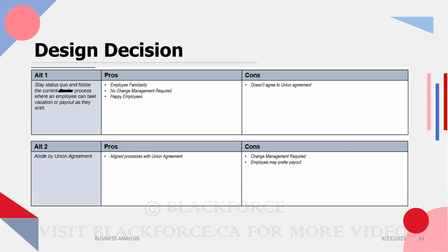When you find yourself in a situation where there is a change that is going to make half of the people happy and half sad, then there's a major decision that needs to be made, and you will not make that decision. You will document it, you put the pros and the cons in there, and then your PM will submit it to management. And management can make a decision. When management makes a decision, it will be communicated through the change management process, right? And then we'll build the solution based on the decision made by management.